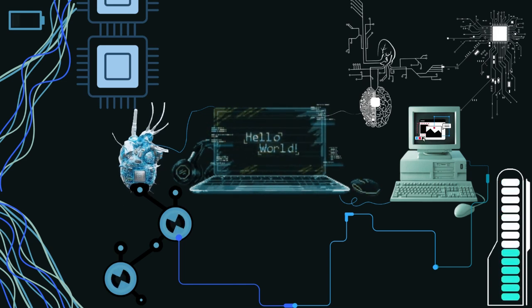Disadvantages include high complexity: it requires careful phase planning and documentation at each cycle. Cost is prohibitive for small projects; frequent risk assessment and prototyping make it expensive to implement. It is best suited for large budgets, not ideal for simple or short-term projects.